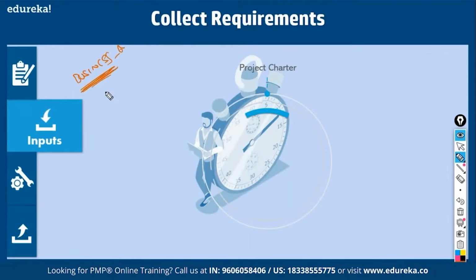Then you have functional requirements, what a particular product should do. Then you have non-functional requirements. For example, the battery should be working for 6 hours, right? That is a non-functional requirement. If you're designing a website, the screen should load within half a second. So, non-functional requirements. Quality requirements refer to what tests it should pass, what conditions it has to be tested against, right? Then project related requirements, for example, what are the milestones for this project? What are those requirements that you have to meet? Okay, like this, we have to gather a lot of requirements.